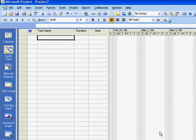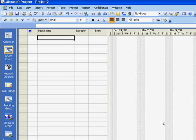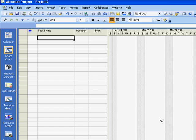If you have read Chapter 19 in the Fast Forward MBA in Project Management, you will recall the importance of selecting the proper task type. On most projects, the majority of tasks are the same task type. Therefore, it is useful to set the default task type prior to entering any tasks.